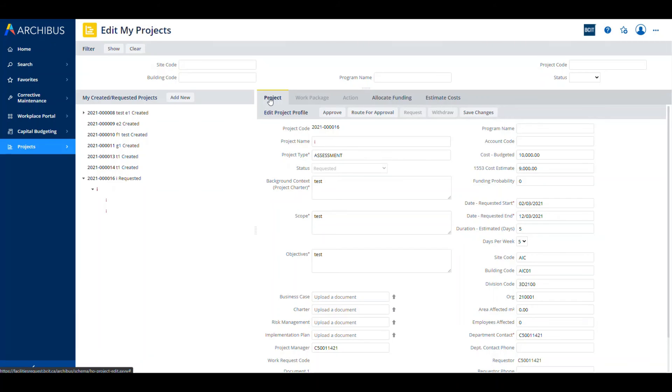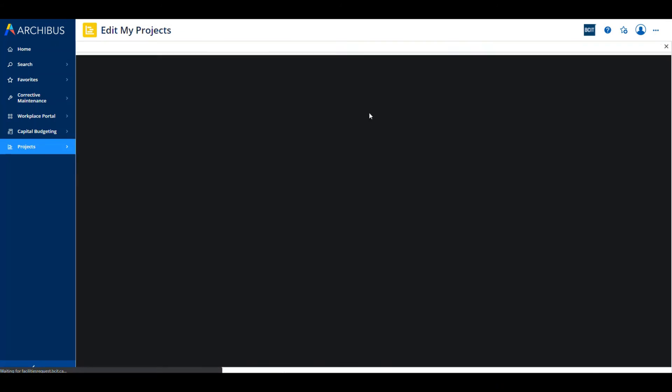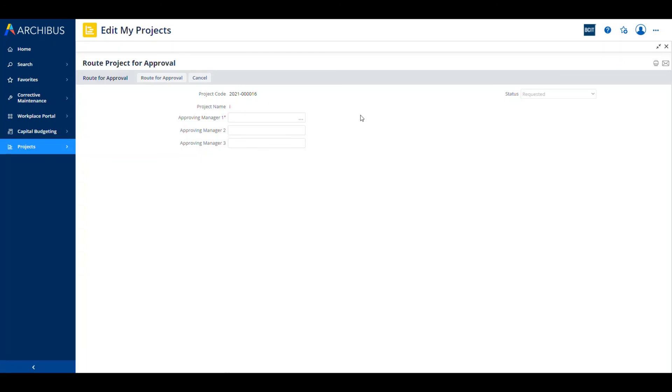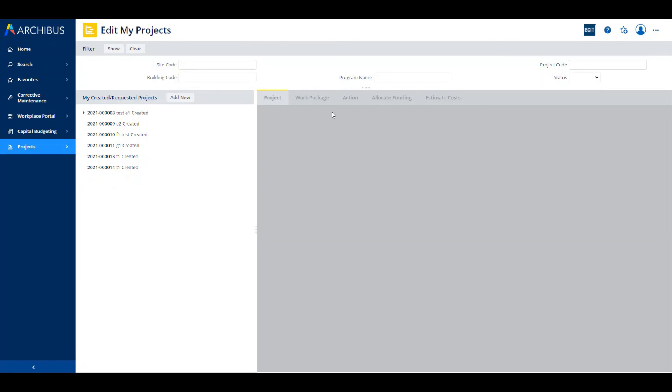When you send it for approval, there's going to be a couple of options typically available depending on your role profile. If you're like me in a test system with some elevated privileges, you're going to have an approve button here. But more than likely, you're going to have to route it for approval. When you route it to approval, you're asked for the approving manager's name. And if there's a second or third hierarchy, you click route for approval when that's completed. And that'll send an email to them. And they'll get back to you when it's ready for approval. In case of this demo right now, we're going to cancel out of that. I'm just going to go ahead and approve this. And we're going to go back to our home screen.